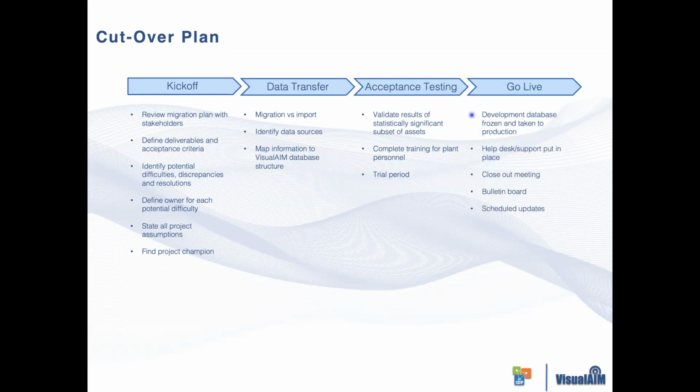Once you go live, you migrate all of the source information from the development database, you freeze it, and basically flip the switch on what's called the production database. And from that moment on, everything is handled by the client, essentially speaking.